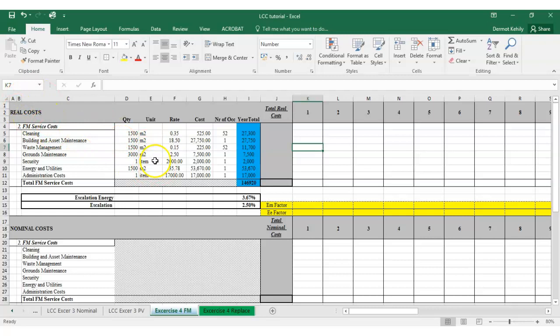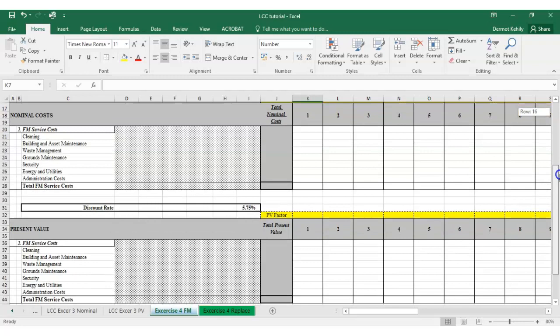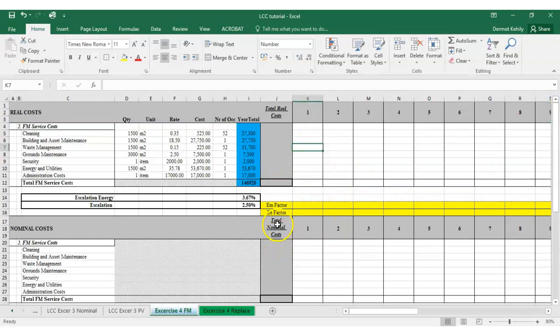Starting with the facilities management costs, in the top left corner we have real costs, and a little further down we have nominal costs — our future forecast costs with escalation rates accounted for — and then our PV or discounted present value. We want to calculate the total nominal costs and total present value, as well as the total base real costs for those items.